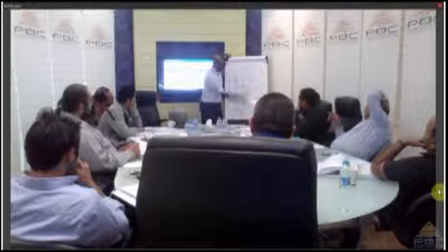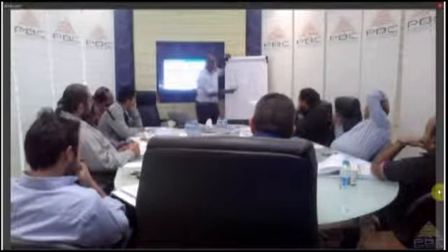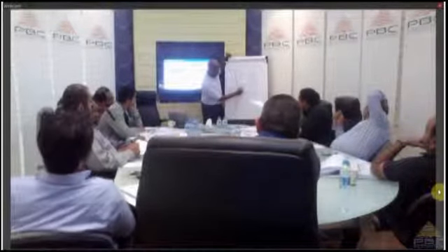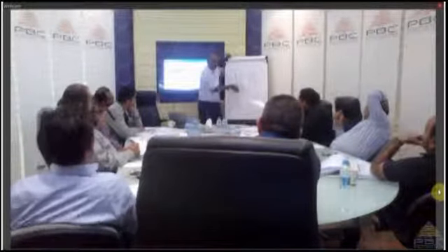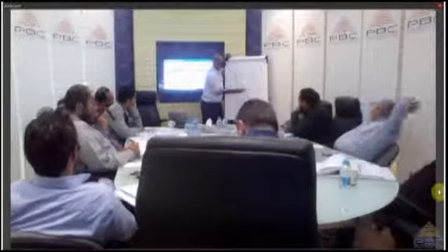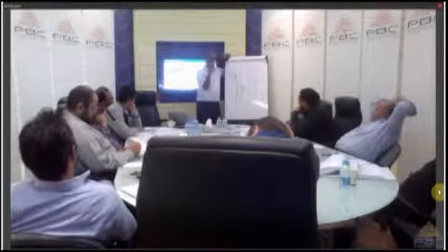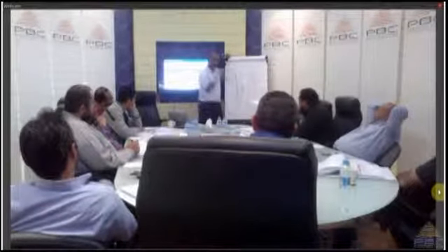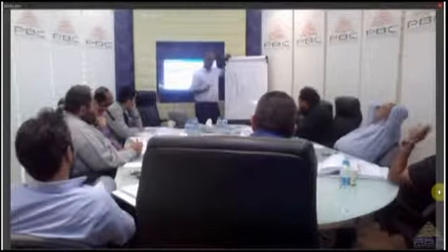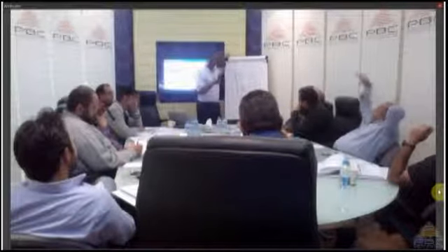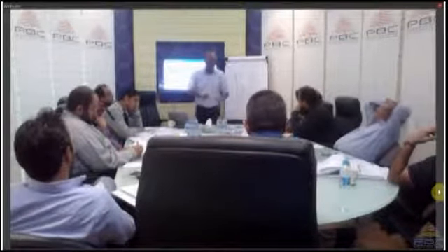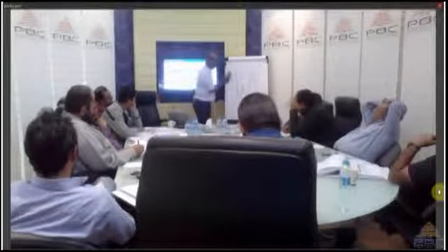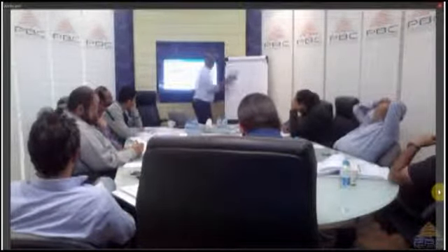So they tell you, okay, you need 200 million, but we want to know how much you need here and here, and so the difference. So they fund you in installments based on what? Delivery performance. Right? So you do phase 1, fine, there you go. It's a monthly invoice. Exactly. So this is another tool or another benefit for the project budgeting process.